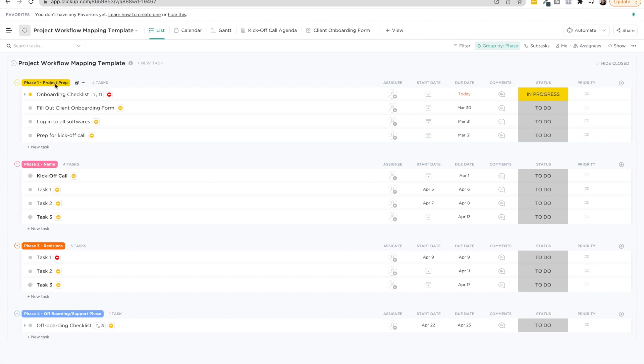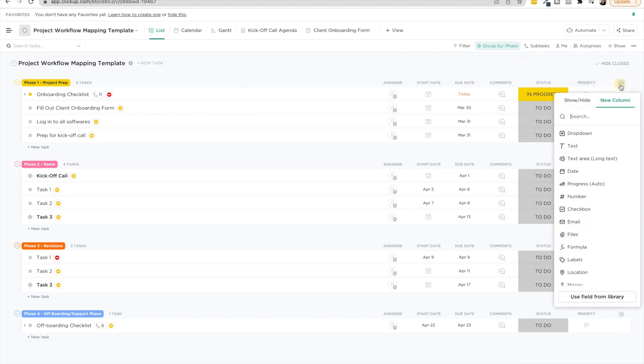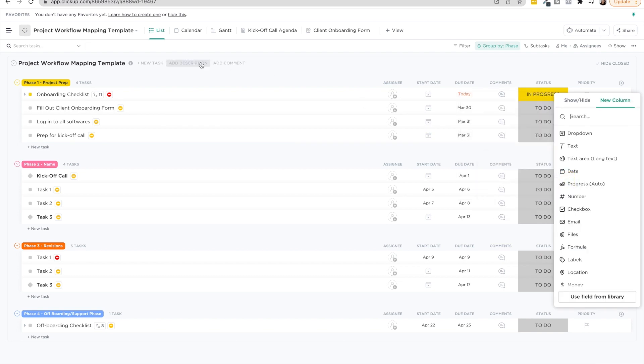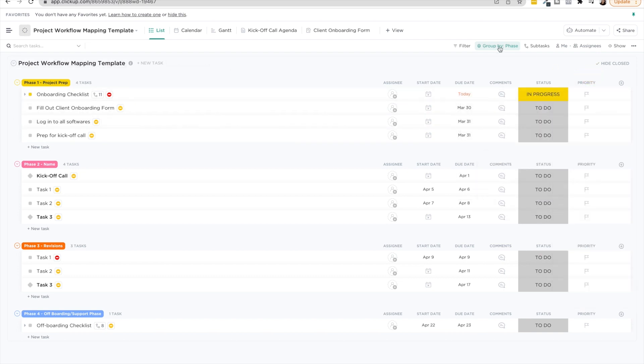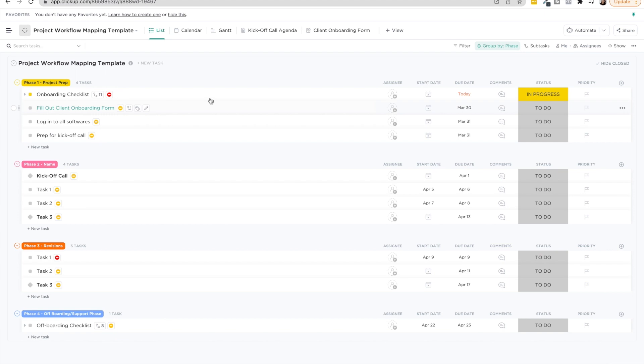So we have four phases in this project, a note here and a little tip. How do we get it to look like this instead of it being grouped by status, which is the default? Well, we actually created a drop down custom field called it phases, and then we grouped by that custom field phase. So that's how we got it. These tasks to nicely group into here so we can see these different phases sectioned out.